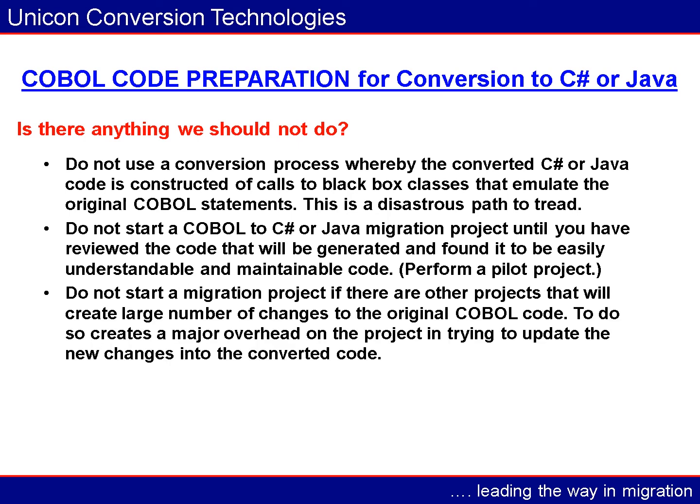Do not start a migration project if there are other projects that are in progress or planned during a migration project timeframe that will create a large number of changes to the original COBOL code. To do so creates a major overhead on the project in trying to update the new changes into the converted code.